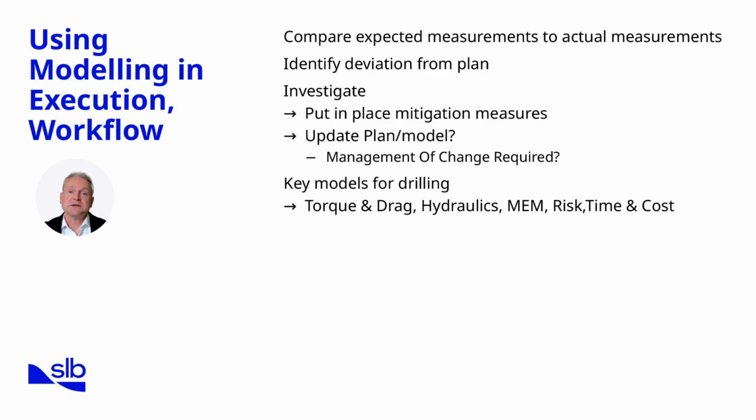Modeling is not just a design phase tool, it is actively applied during execution. The core principle is to compare expected measurements from the model with actual downhole measurements in real time. When a deviation from plan is observed, the workflow begins with investigation. The engineer asks, why is this different?